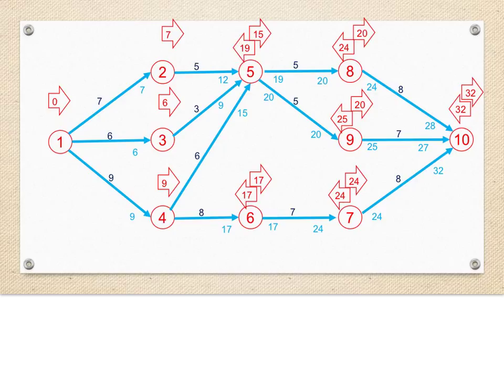And this becomes the latest finish time of event 5. We continue by subtracting the durations to get latest start times of 14 days, 16 days, 13 days, and 9 days for tasks 2.5, 3.5, 4.5, and 4.6 respectively. These values then become latest finish times for events 2, 3, and 4.